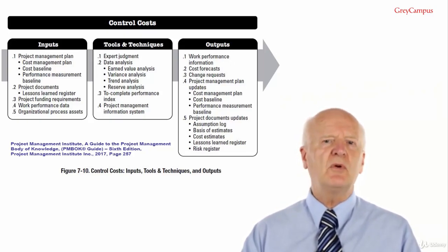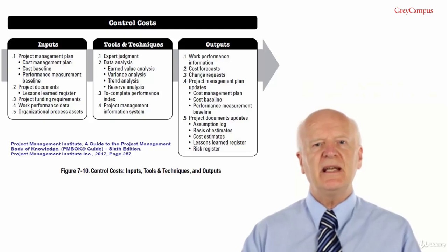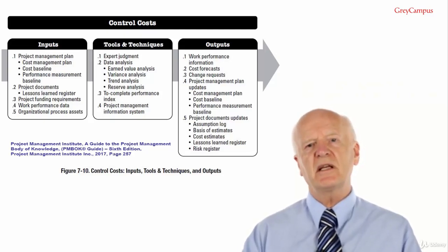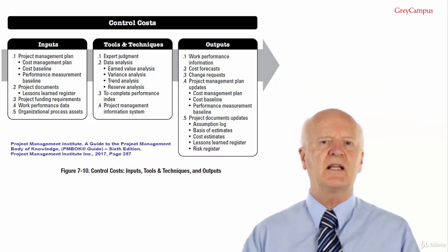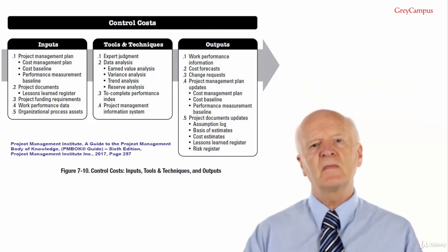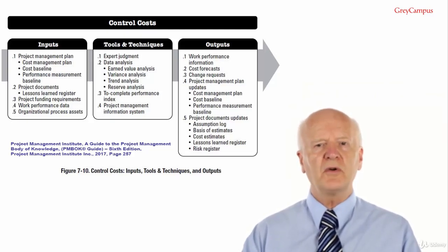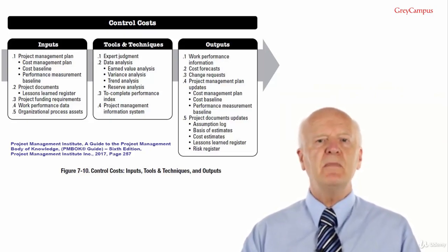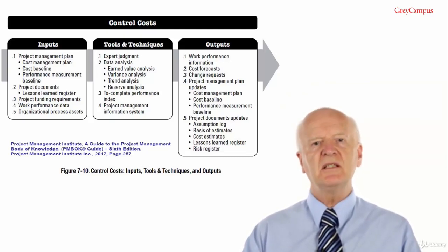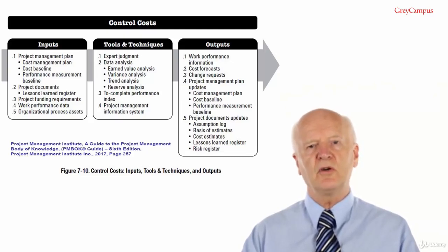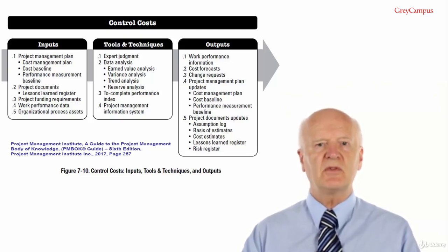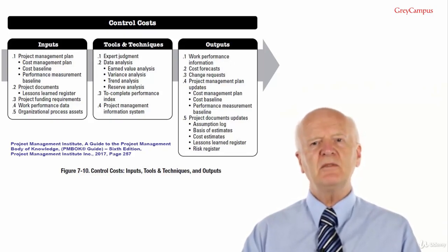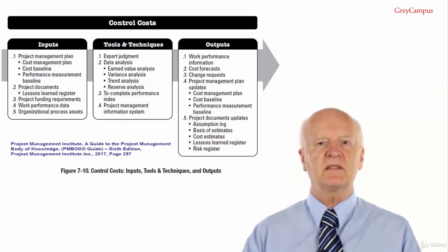We have arrived at a very important part of earned value management. It is important that you go over this next section a number of times until you have a good grasp of it. As a quick recap, planned value, PV, is the authorised budget assigned to the scheduled work. Earned value, EV, is a measure of the work performed expressed in terms of the budget authorised for that work. And actual cost, AC, is the realised cost incurred for the work performed on an activity during a specific time period. Budget at completion is the budget for the whole project.